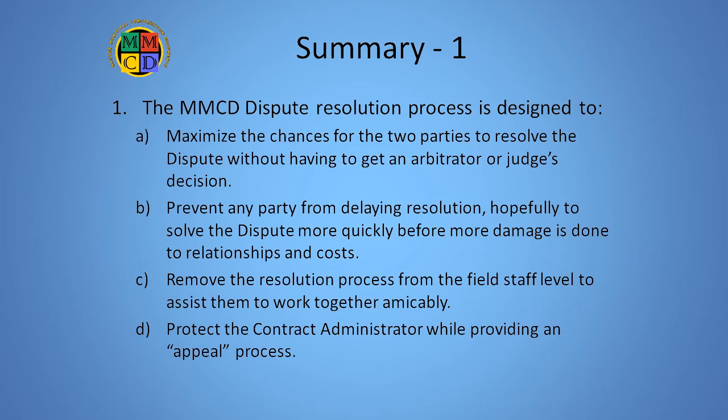So let's summarize. 1. The MMCD process is designed to A. Maximize the chances for the two parties to resolve the dispute without having to get an arbitrator or judge's decision. B. Prevent any party from delaying resolution, hopefully to solve the dispute more quickly, before more damage is done to relationships, costs, and schedules. C. Remove the resolution process from the field staff level to assist them to work together amicably. D. Protect the contract administrator while providing an appeal process.